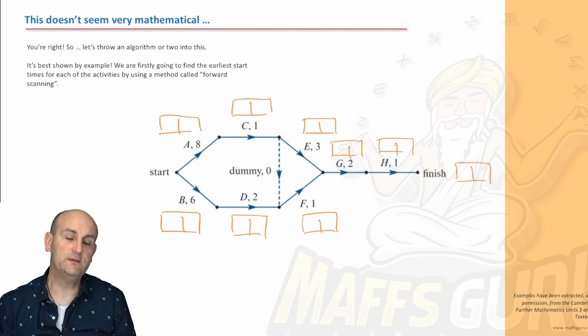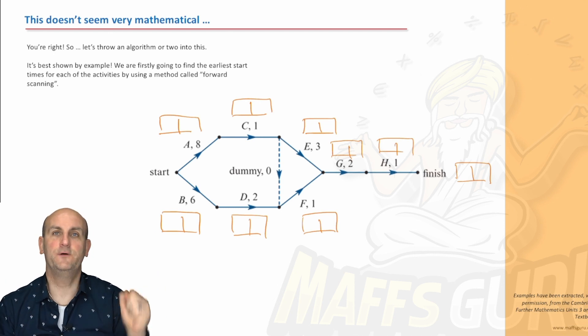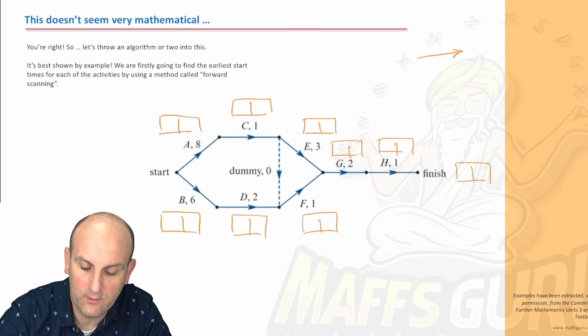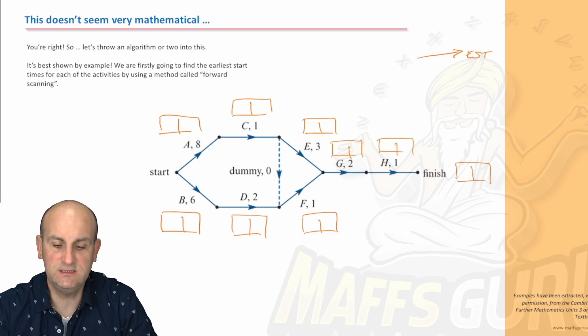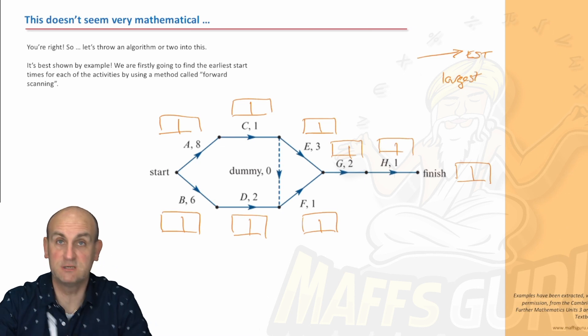First things first, we scan through the diagram from left to right. And that's going to find the earliest start times of each of my projects. So when we scan that way, we are looking for the earliest start times. And in that situation, we choose the largest of any possible choices.